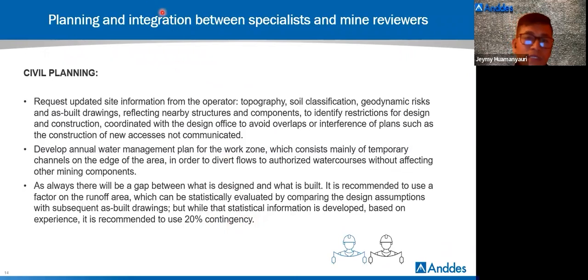Planning integration between specialists and mine reviewers. About civil planning, request updated site information from the operator, like topography, soil classification, geodynamic risk, and as-built drawings. Another is to make an annual plan for water management for operation zones.